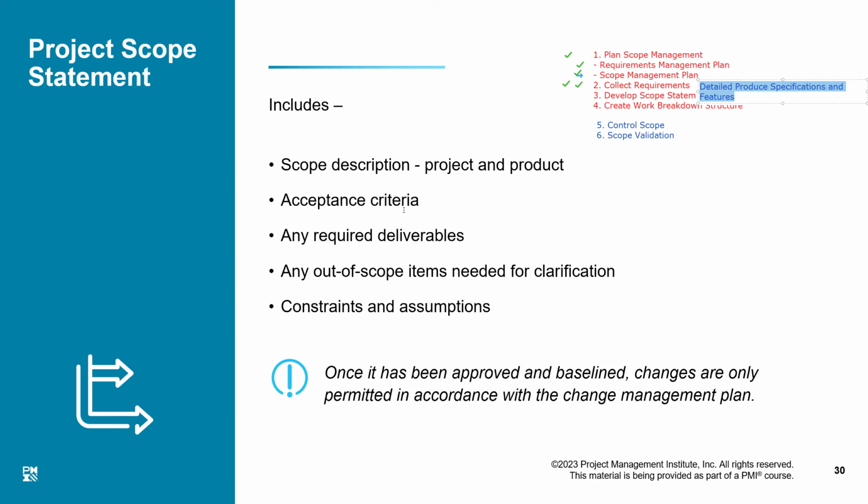Okay, so where is the acceptance criteria established? The rules were established in the scope management plan, but the actual acceptance criteria can only be established at the end of scope. Your scope statement gives you the overall acceptance criteria, which is written in the contract. What the customer wants. How would they approve it? So that acceptance criteria is provided. It is part of my scope statement.